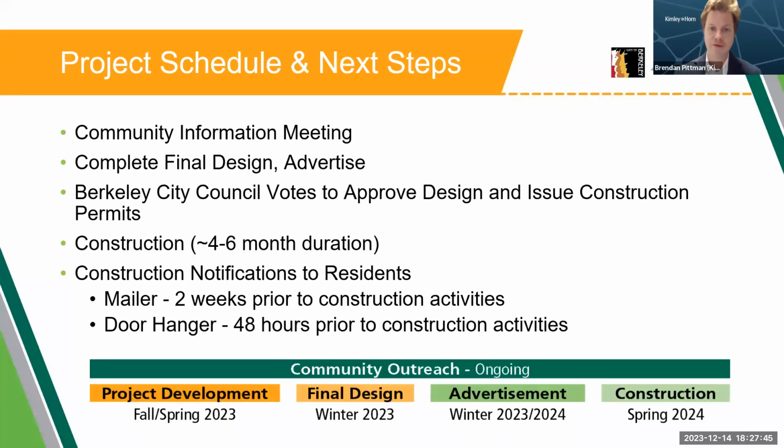The last item we wanted to go over was the project timeline and what is coming next. After this community information meeting and your feedback, we will finalize the design and advertise the project for construction. A staff report will be developed for the project, and the City Council will be asked to approve the design and allow city staff to issue construction permits. Once a contractor is hired, we anticipate construction taking 4 to 6 months, depending on the lead time for some of the building materials.